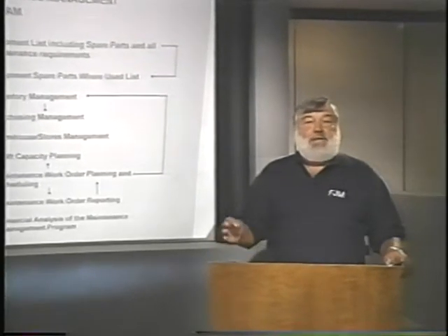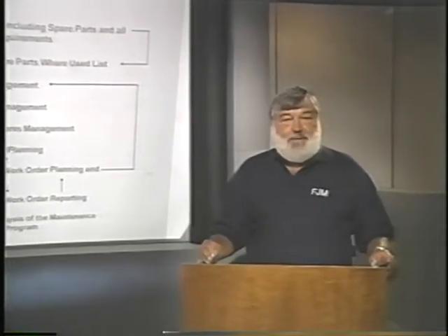We have coupled the inventory management program relative to spare parts requirements into that planning and scheduling function, and we have likewise integrated the craft capacity requirements for that PM activity. And as I said previously, the PM work order generally addresses labor and spare parts, so that this exhibit demonstrates how these functions are interrelated.